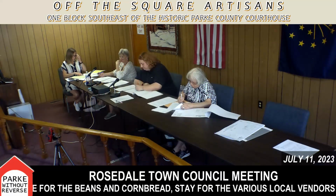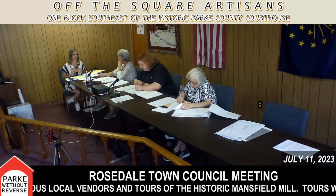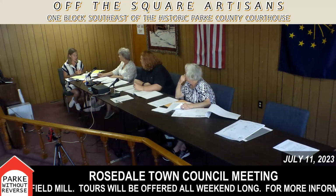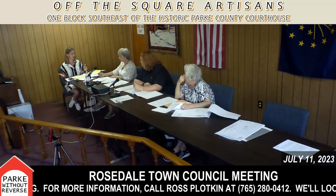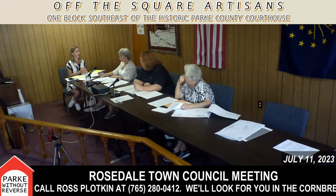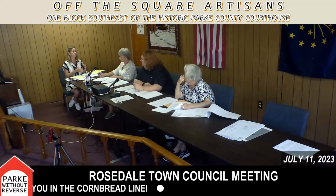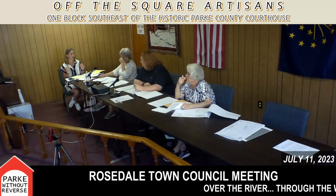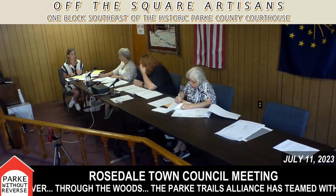A couple things Matt pointed out to me that are really pretty smart, which I guess is why he's the meter salesman. He said a really good way to do it is, in your higher usage months, since you can't replace meters in the winter anyway, you buy 10 in May, you buy 10 in June. You don't buy 50 all at one time, but incrementally buy these, 10, 10, 10. Replace them as you go, and then you're also not sending your guys out to do 50 meters at the same time. That's smart. And he thought the 50 number was a good starting point, 50 to 60.